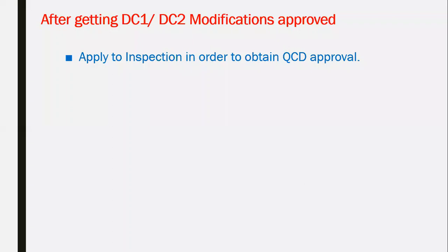And also one point you have to take note of: for the civil defense inspection submission, you have to prepare copies of all testing, commissioning and site test reports for all the life safety devices. For all systems you have to provide a testing report copy, and they must definitely be certified by a certified QCDD engineer.